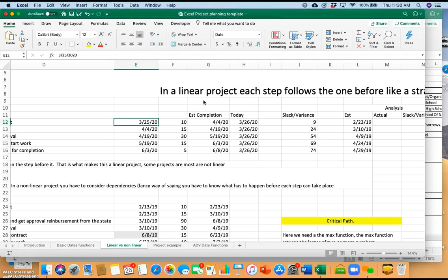And then at that point, what do we want to do? Do we want to hustle it up? Do we want to revise our estimates? Do we want to add more days, which is going to push out the completion date, or do we want to pressure folks to get it done so we can stay on target? So it becomes a way to manage the information. My use of the terminology is my own: if it's a positive number, it's slack, kind of extra wiggle room. Once we go negative, it's a variance, okay?